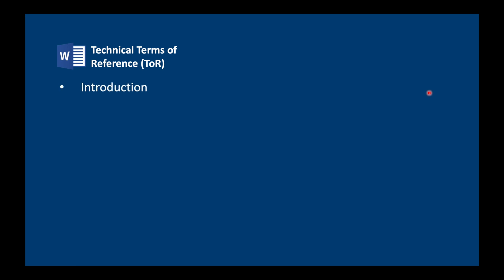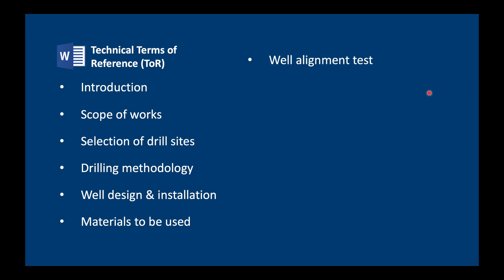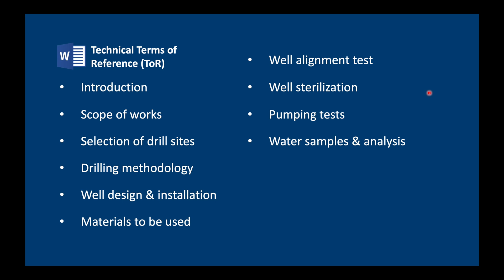Terms of reference should have an introduction, a scope of work covering: how we're going to select our drill sites, who needs to be present, GPS readings, what drilling methodology is appropriate — rotary drilling, downhole hammer or whatever — how we're going to design the well, how we're going to install the casing and screen, what quality of materials must be used, what kind of well alignment test is needed, how we're going to sterilize the well, what kind of pumping tests need to be carried out, who will take water samples and what parameters need to be analyzed, what reports are required from the contractor, and who is going to supervise the works.